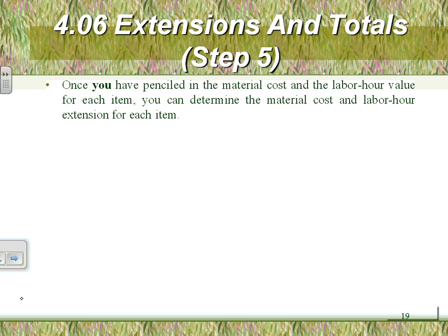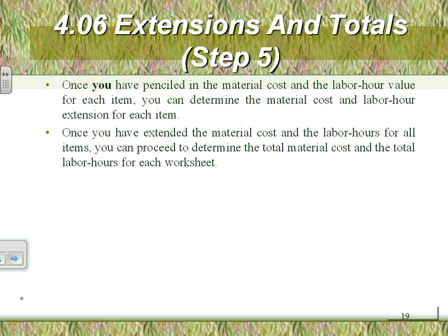The last thing is extension and totaling, guys. Extending and totaling is doing the math. So do me a favor, look at page 61, the bottom of page 61, right here. Can you see 1,825 and 94 cents? Adding all the dollars will get you the totaling. Extension and totaling in 81 hours. That's the totals, right? What's the extension? When you multiply them, it will give you extending and totaling.